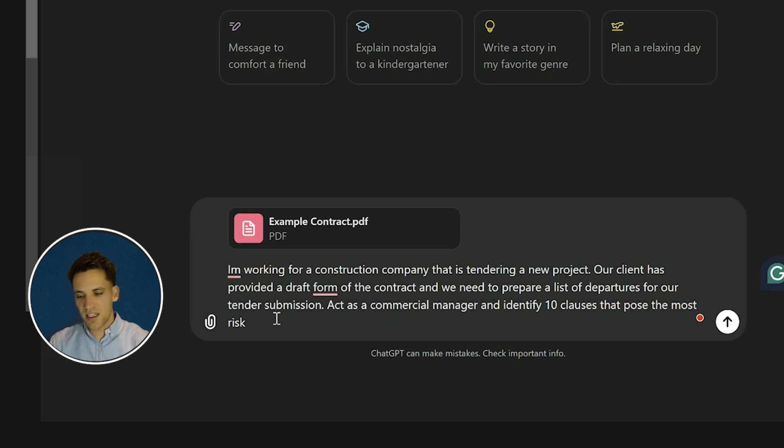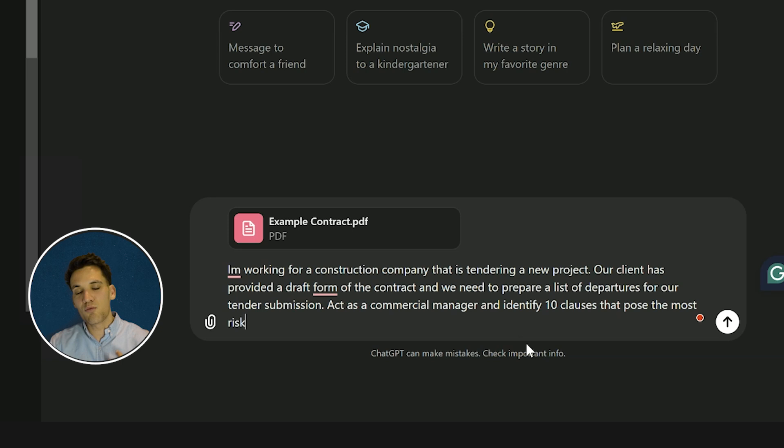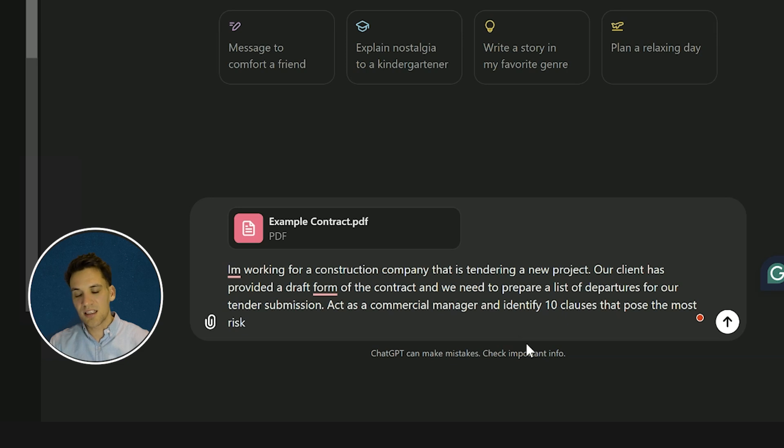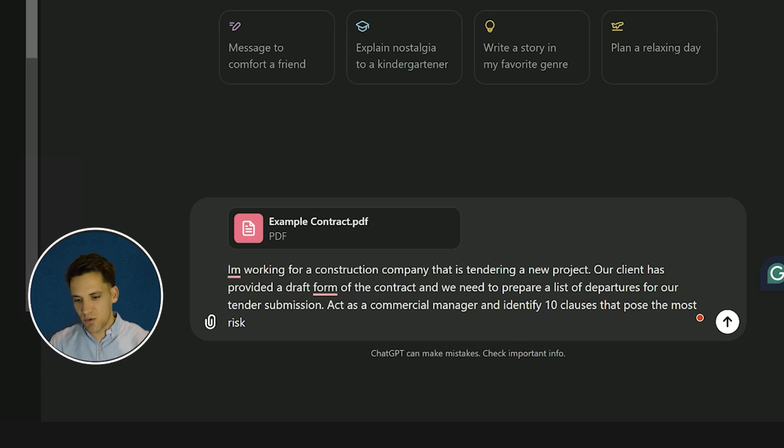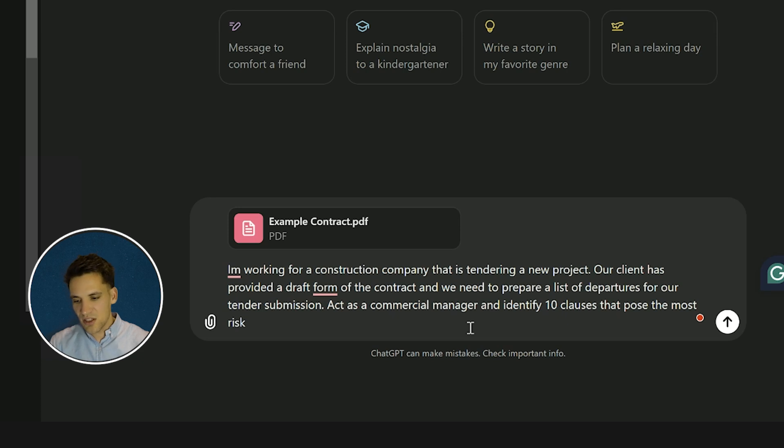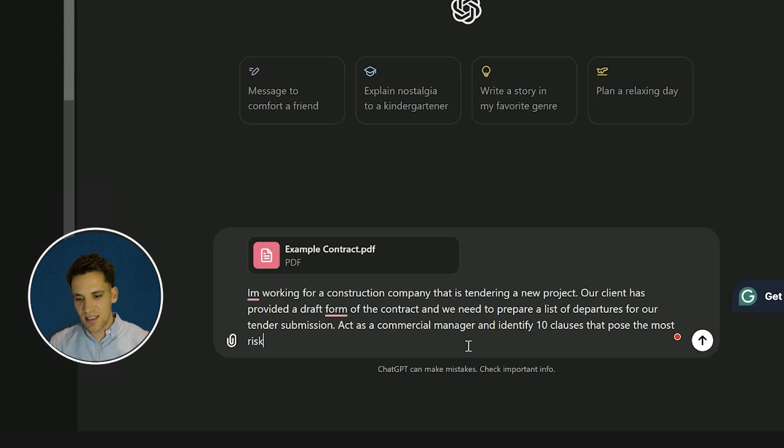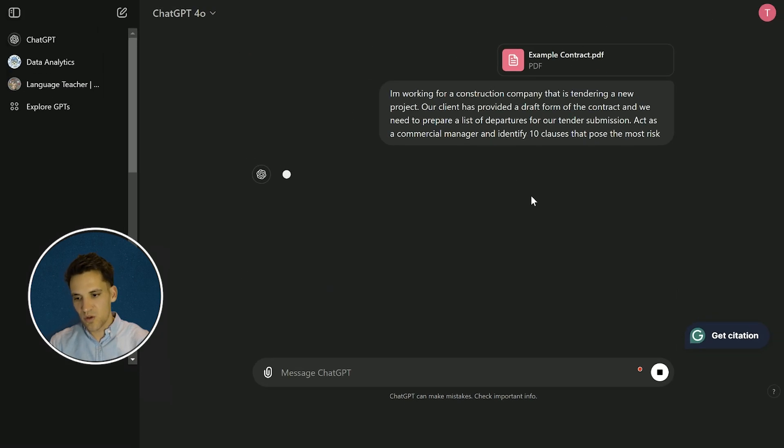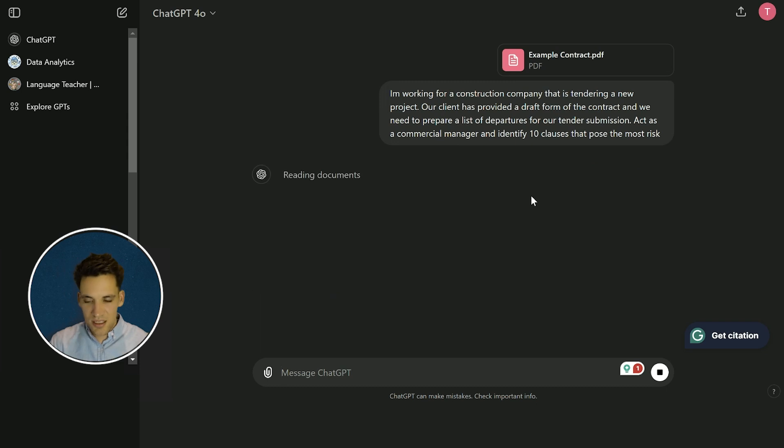So what I've prompted ChatGPT to do is I've told it I'm working on a construction project tendering a new contract. Our client has provided a draft form of contract and we need to prepare a list of departures that we're going to submit with our tender submission. I've told ChatGPT to act as a commercial manager and identify 10 clauses that pose the most risk. Then you send it to ChatGPT.